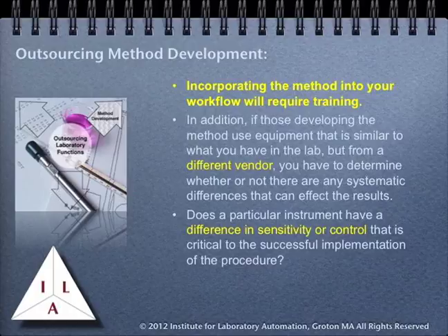Part of the acceptance of the test method should be a side-by-side comparison of samples run in their facility as well as done in your own using your own equipment. A systematic difference should be addressed and reconciled. Realize that if the vendor's equipment has some significant advantage over that which you have in your laboratory, the cost of implementation may include the purchase of new hardware. It might be simpler and less expensive to do that than to adjust the method.